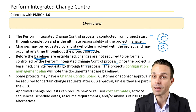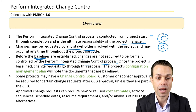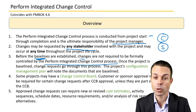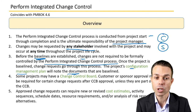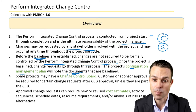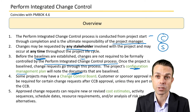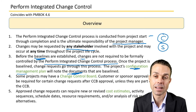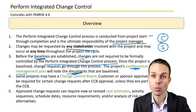But once something is baselined or locked at a point in time, change requests have to go through this process — anything has to go through the proper change request process. The project's configuration management plan will note the documents that are baselined, which you'll see come up sometimes in your PMP exam. The configuration management plan tells us which documents need to be baselined, and the change management plan tells us how to go about making those changes and informing the right people.